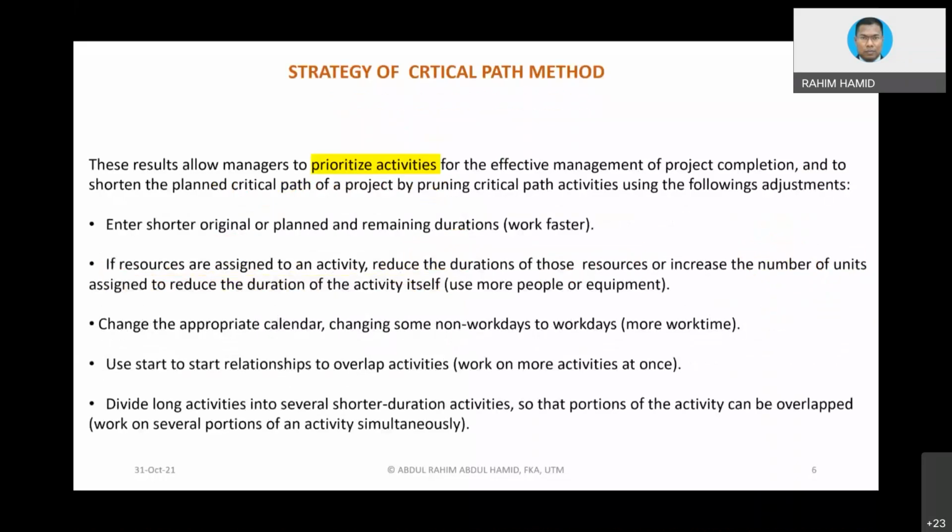Prioritize activity. Okay, now let's see. For instance, sometimes in a real situation, we might encounter delay. So how would you handle that? Sometimes the activity is very long. If this activity is connected with the following activity, and you already completed a certain portion and then you experience delay, for sure this activity will be extended further, and the following activity will have to be pushed back.